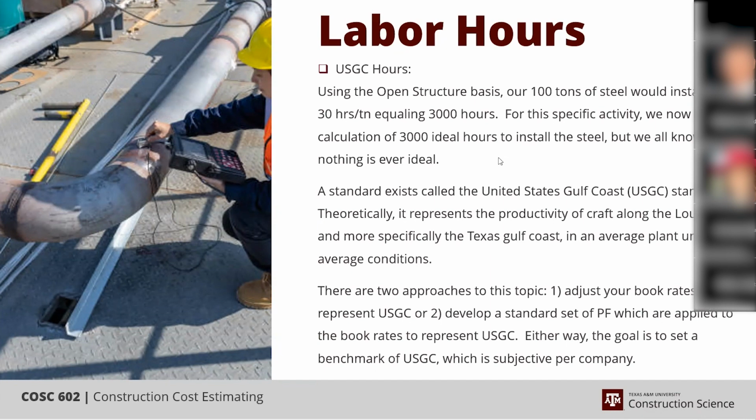And if Page and Nation already has your Gulf Coast represented, you don't have to put anything else on it. Because theoretically, Page and Nation is supposed to represent a U.S. Gulf Coast standard, but that doesn't mean that it does. It's just intended to. So every company needs to understand how it operates, particularly in these situations.